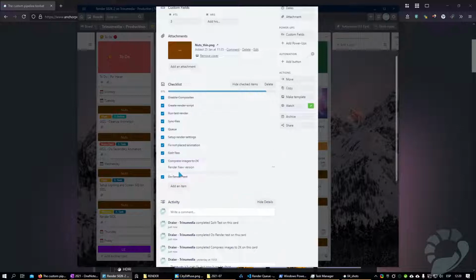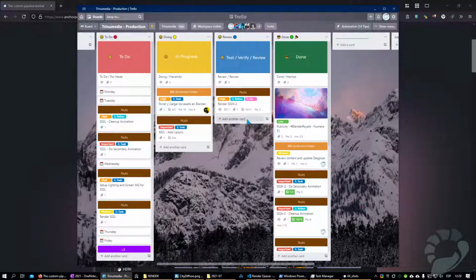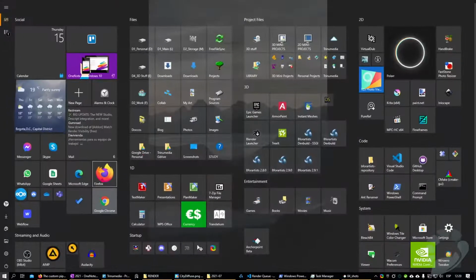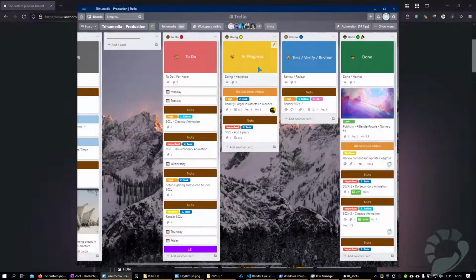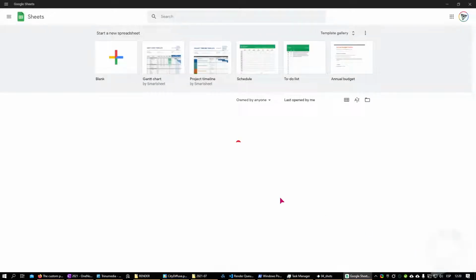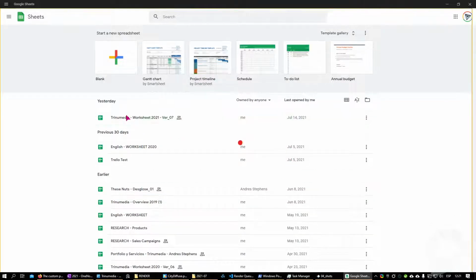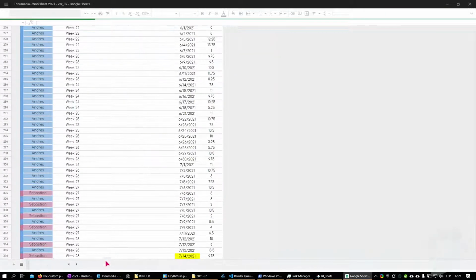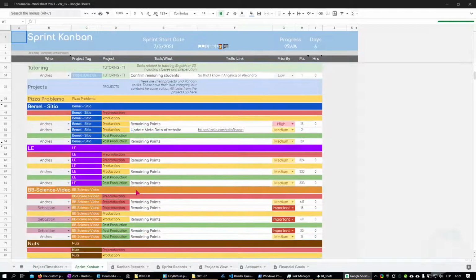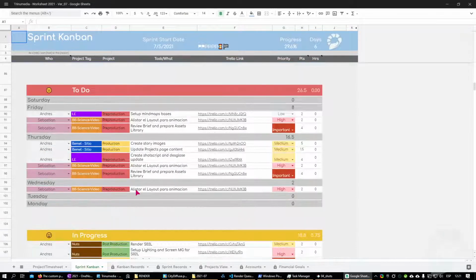Versus, if you're talking Scrum, that typically runs what we call sprints, which is a period of, whatever, it can be anything, 1 week, 2 weeks, 3 weeks, where you expect a piece to be completed and ready for production within that time frame. And Marty, you mentioned you worked at Microsoft as well, right? Yeah, I spent 2 years working on a very large project with a couple hundred people, and of course, at Microsoft, you use Agile and all of its related buzzwords badly.